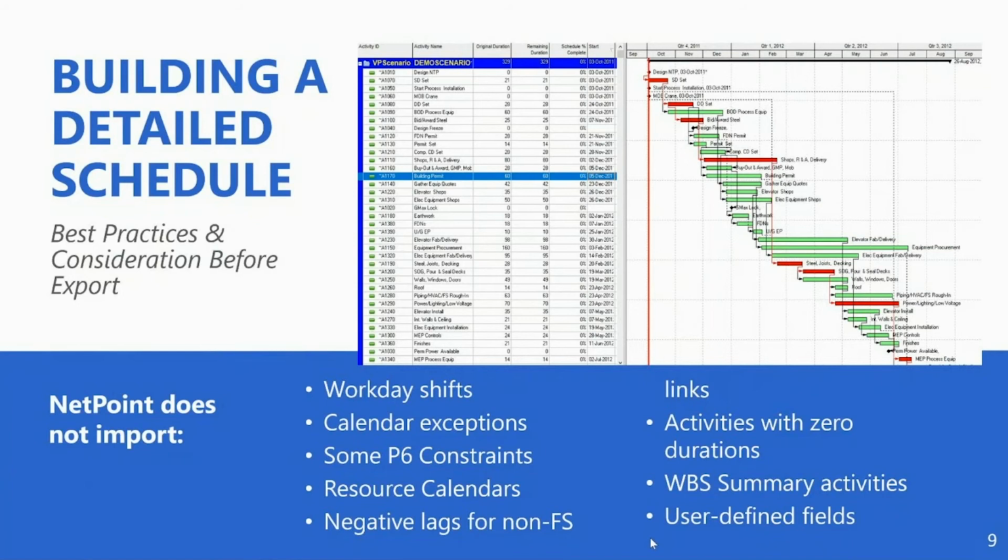Similarly, resource calendars are ignored on the import into NetPoint. Activities with zero durations are not supported by NetPoint, so they're converted to delays, and any WBS summary activities are also ignored. Any user-defined fields that you might have in your XER are not imported into NetPoint and are not available in the tool.